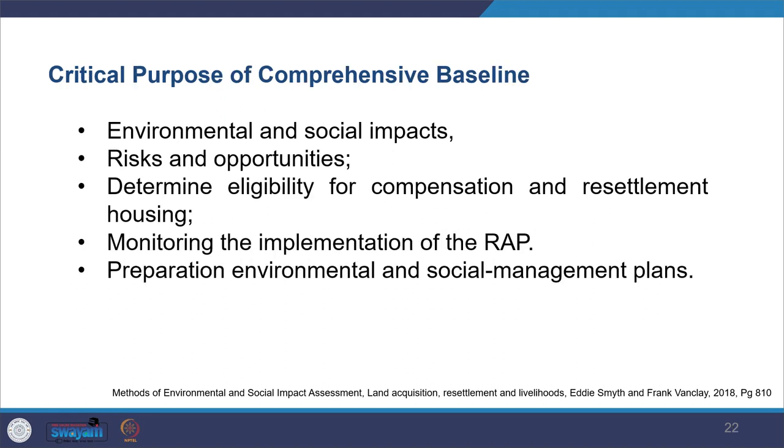So when you undertake a comprehensive baseline, the critical purpose is that you look into the environmental and social impacts, what kind of impacts would happen. And then you also look at the risks and opportunities. So what are the risks and opportunities involved in this? And then you also look at the eligibility for compensation. There might be a lot of confusion, so who all are eligible for compensation and resettlement for housing purposes, and how you're going to monitor the resettlement action plan, how you're going to implement that, and how you're going to prepare environmental and social management plans.